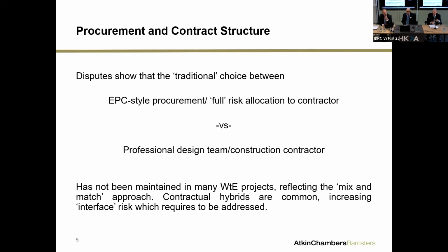Again, my experience is that the traditional choice in procurement structure is not being followed in quite the same way as when I was young. It is no longer this hard and fast distinction between choosing an EPC style procurement, placing all the risk in design and build on the contractor, versus taking on a professional team who design a nice process for you and then hand it over to the contractor who then builds it for you.